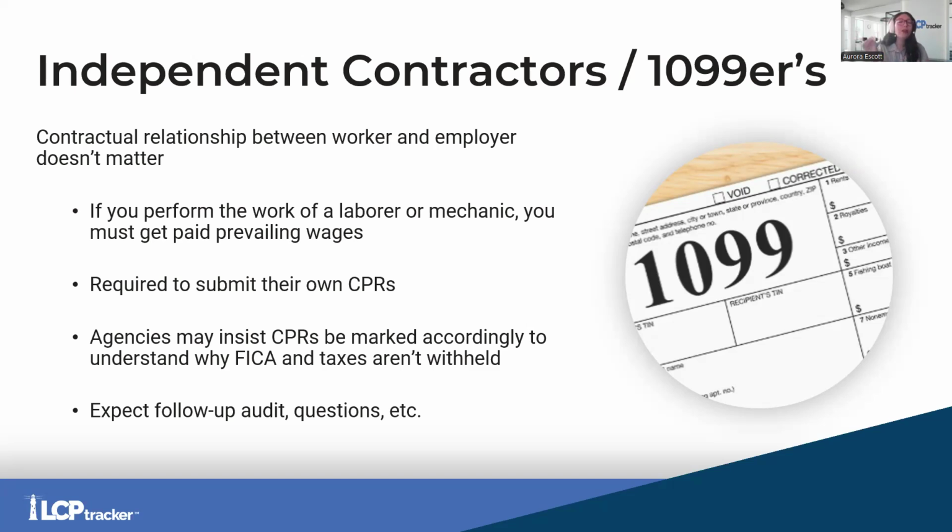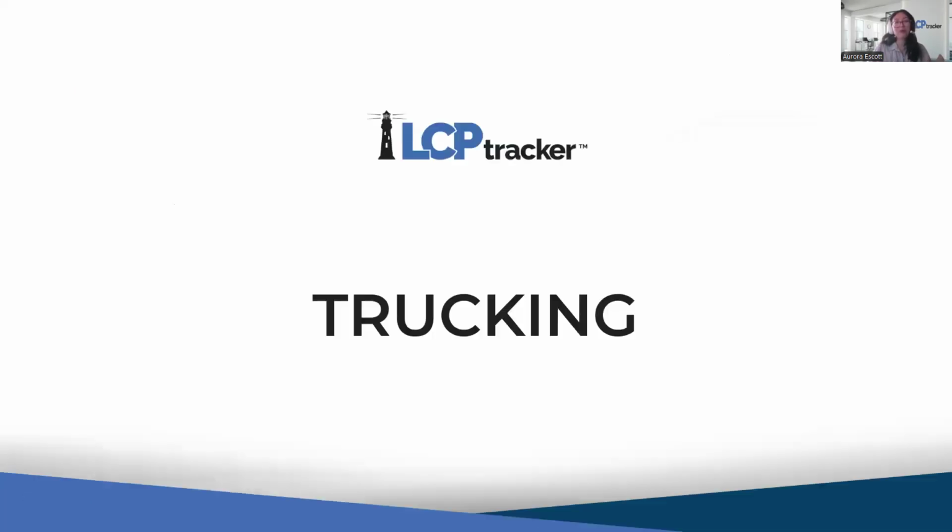And if for whatever reason you list a 1099er in your team's certified payroll report under craft and classification, I bet you some good money you're going to have several questions and maybe even an audit pop up, because people are really going to be scrutinizing whether you know your employer responsibilities. Whew, okay. So let's talk about trucking.